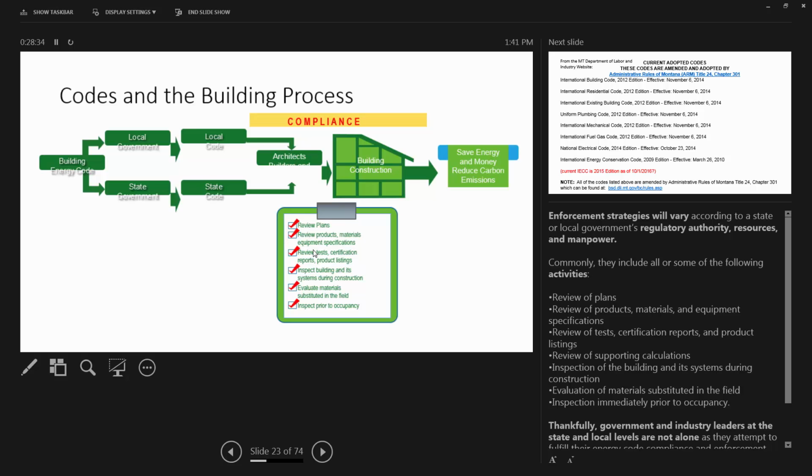You're demonstrating a model of your energy performance, and then as the building gets built, you have to continue to comply with your inspections, visible air sealing inspections and insulation inspection to make sure that everything's done as per code, done as per your model.